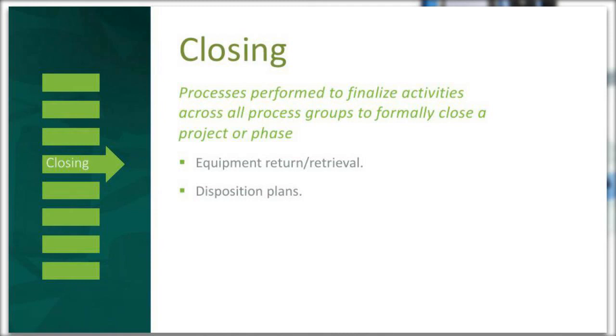This, of course, leads us to the closing process. This is the last process normally in the group, and it's to finalize any activities across all process groups to formally close a project or a phase. Now, like Dan had said before, this is another one of those parts where it's very good to be proactive versus reactive. Your equipment return or retrieval, are you going to have to return any of this equipment or retrieve it back from the sites?